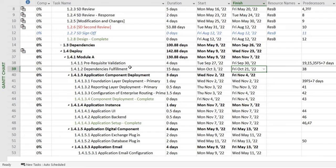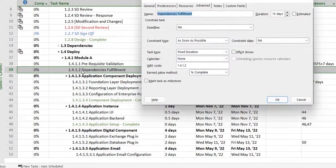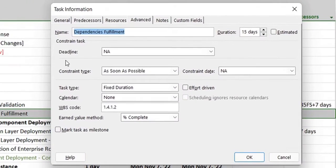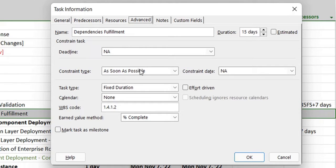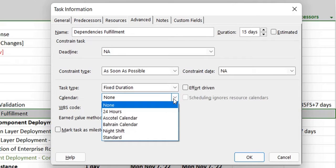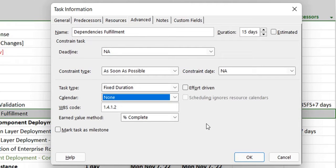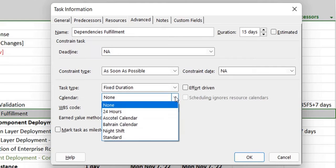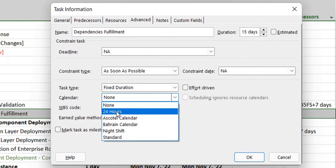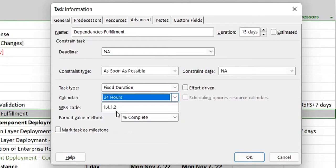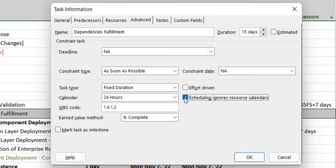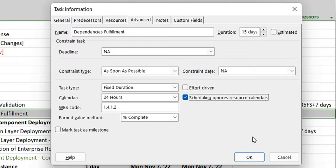So firstly, I will double-click on the task, go into the task information, and in the advanced tab you can see the calendar over here is none. By default it's none and it uses the overall project's calendar. However, since now I want it to change, I will select 24 hours over here.